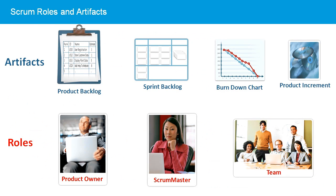Scrum contains three core roles: the product owner, the team, and the Scrum Master. The product owner owns the vision of the product and interacts with the stakeholders to create the requirements held in the product backlog. The product backlog holds the features, bug fixes, and non-functional requirements needed to successfully deliver the completed product. Items in the product backlog are ordered by priority, with the highest priority items at the top.